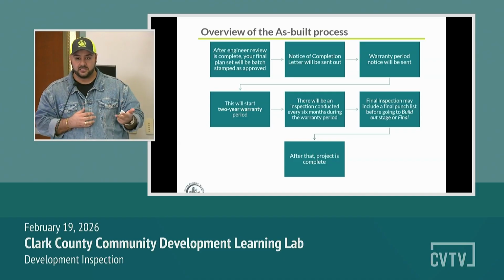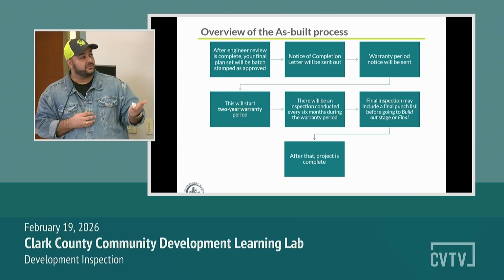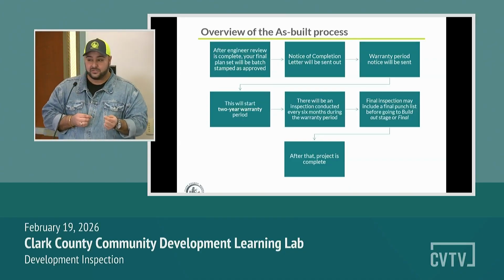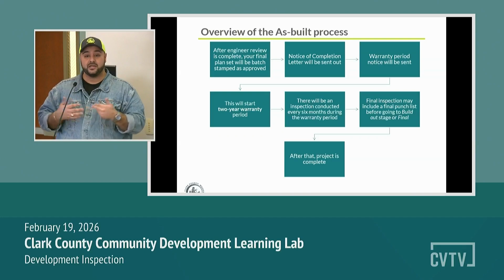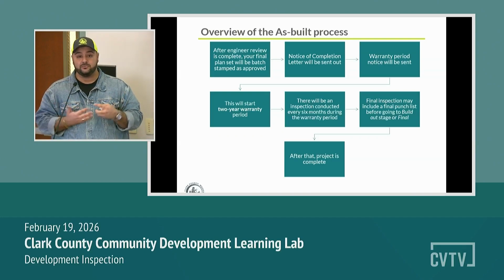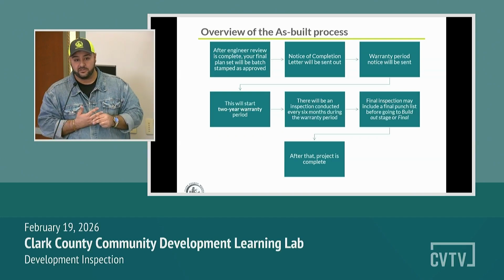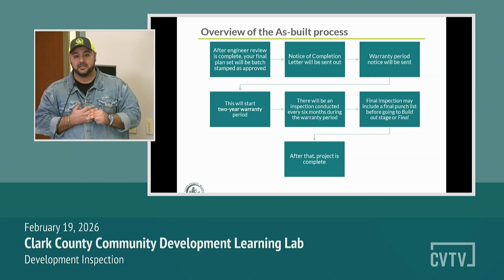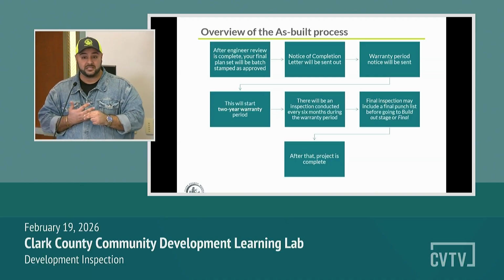The additional 6 months, we will come back and do another check. The third and the fourth, which would be 22 months, so right before that 2-year mark, to give you that extra time to make sure everything is completed before we really reach the 24-month period. That 24-month period, we have what we call a 22-month SWE inspection.